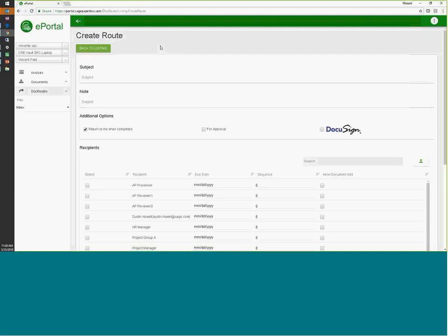Besides just sending a new document to somebody, what if you wanted to take a picture of a wall that happens to have the electrical circuit a little bit too close to some piping? You can say, subject: request for information, piping and electrical. And I can put in my notes: too close, should I move them?